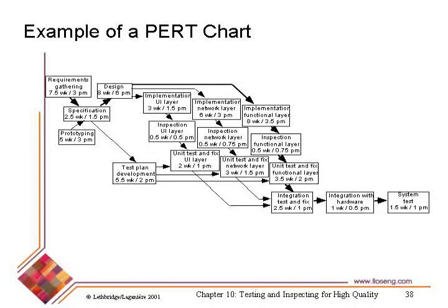Notice that specification also, once you've done that, you can move on to the test plan. So the test plan can be done in parallel. And then once the test plan is done, you can then do unit testing. So unit testing is dependent on both the inspection and the test plan both being finished. Okay, so these are the dependency links.